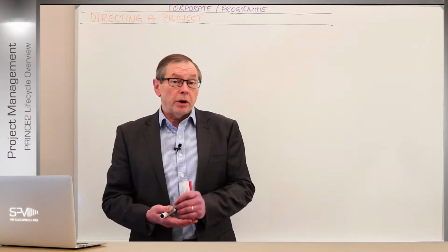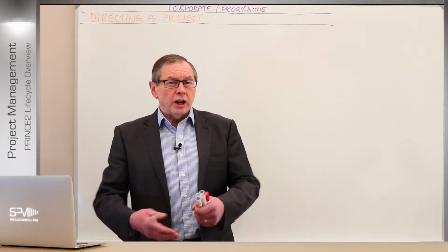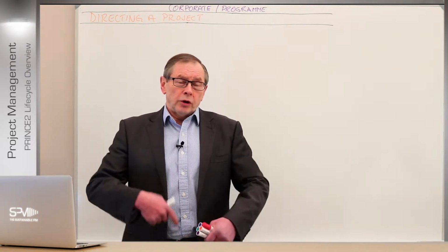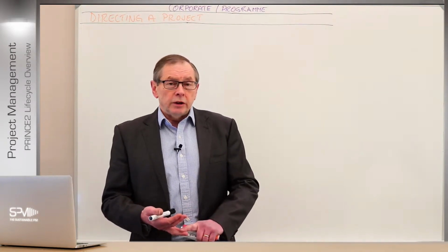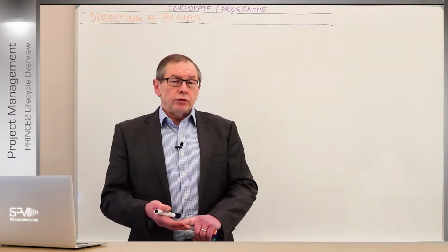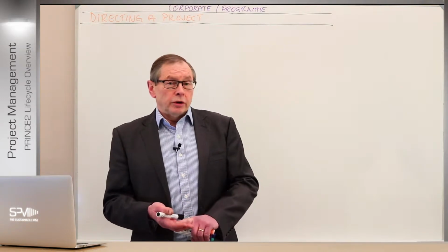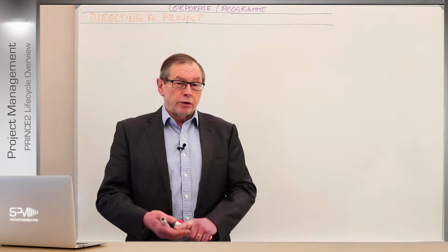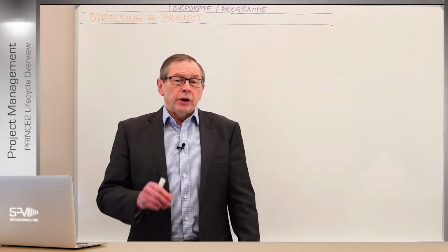We put a lot more detail behind the project. Initiating a project is a process, but it's also a stage now because there's a lot of work going on. We've gone through all that, put the plan together, understood how we're going to handle certain aspects like risk and quality, finalized the details of the organization, controls, benefits review plan, and looked at the approach we're going to take, how we're going to build the solution from here onwards, which they call the project approach. And then finally, put in a plan for the next stage.